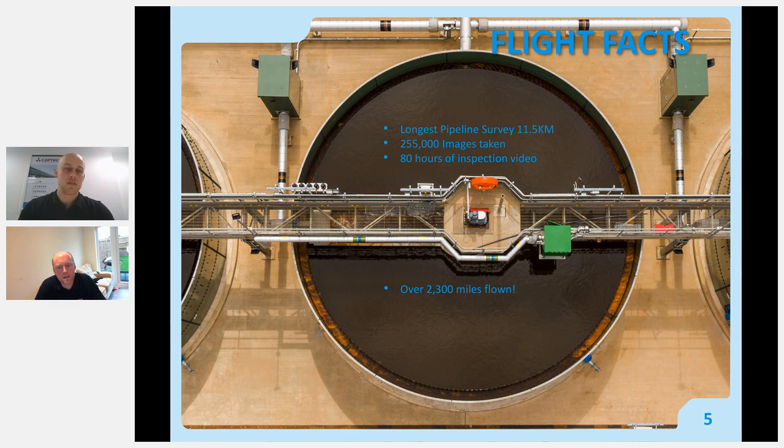What's the trade-off? Once we got up to speed, we were seeing about a 20% increase on like-for-like time, but the amount of data we were capturing was 1,000 times as much, because, as I say, instead of just getting single points along that particular route, we're able to capture such a wide piece of that landscape, which has added that benefit to the planning piece. And when you're on the ground in a lot of these areas, you can't see over the hedge, you can't see what's on the other side of the riverbank, but being able to model all that data has been really useful for our design teams, providing them with more intelligence about what the landscape is actually like.